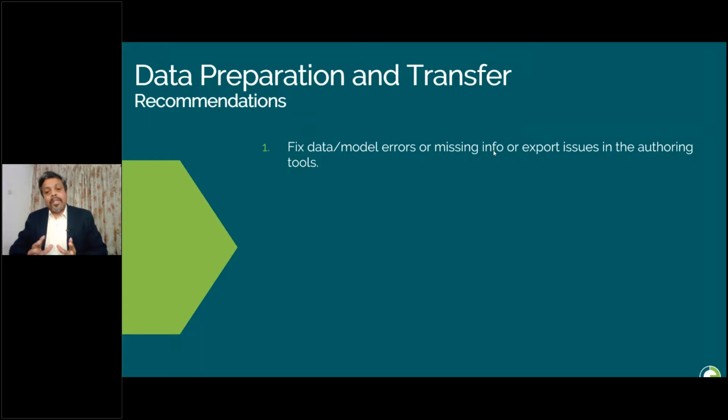Internally, O3 uses many techniques for data and model conditioning, but the best practice and best place to fix these problems is in the source. We do data conditioning based on rules, so when we get the revised model, O3 will be able to deal with that without any manual work. But the issue is still there in the source data, so if the source data is used for another purpose, this issue will still be there. So it is a good practice to fix the issue in the source.